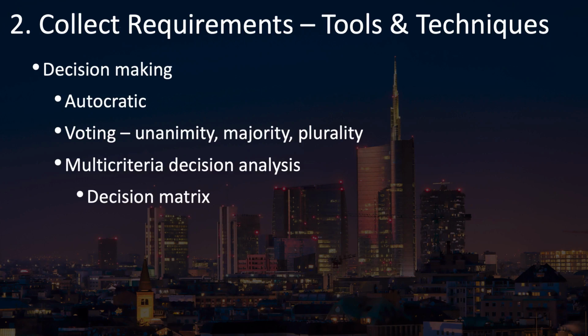If you come up with an NPV, that's a single number, but there'll be a range. And some requirements may have a small range of possible value, while others could have a wide range of possible value and even have the possibility of having negative value. So this kind of risk can be factored in to your multi-criteria decision analysis.